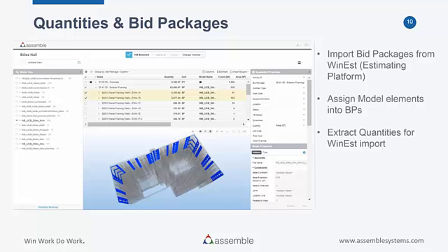Now, while there's no live link between WinEst and Assemble yet, or perhaps other estimating software, what we can do is export that view that you can see on the screen right now, that schedule essentially, to Excel, and that becomes our input document to WinEst. So it tends to optimize and streamline the data flow from one platform to the next. And we're looking forward to even better connectivity between various software.